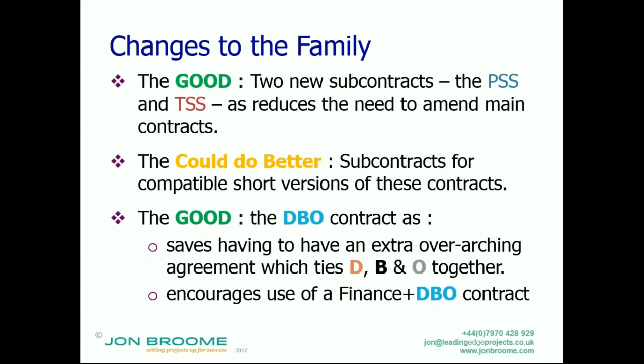However, having said that, if I was a client and I made it clear to my tendering contractors, I am not going to pay you anything until you start operating it, then that consortia of contractors or the individual contractor might go, right, well, I need to approach a bank to get a loan to finance the design and building of it before I start operating it. And effectively, in simple terms, it does become a design, build, operate contract.